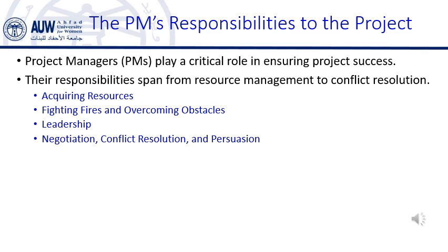Example. Imagine a construction project. The PM needs to make sure that workers, construction materials, machinery, and equipment are available when needed. If the PM does not acquire the necessary resources on time, the project could be delayed or go over budget. For example, if the project requires steel for the foundation, the PM must ensure that the steel is ordered in advance and delivered on time, avoiding delays in the construction process.